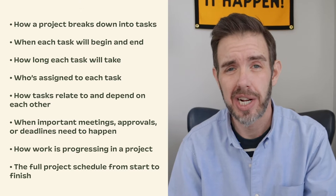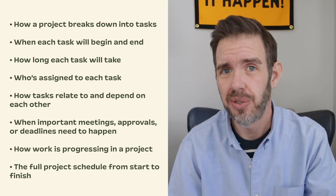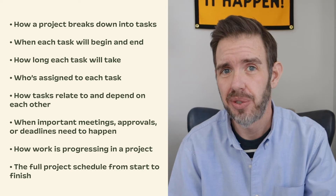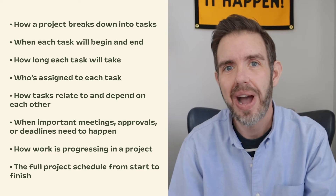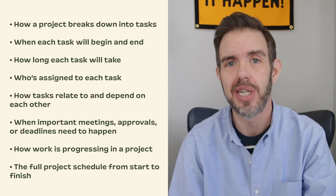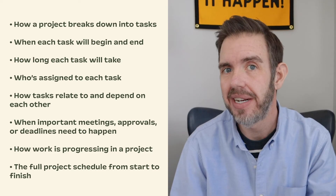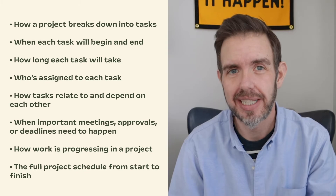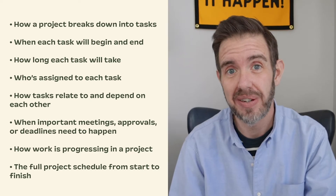That story tells me and my team how a project breaks down into tasks, which immediately shows everything that needs to be done on the project. Then it shows when each task will begin and when each task will end, which you need to communicate in terms of deadlines to stay on top of things so that you can deliver your projects on time. I also like the fact that in Gantt charts, like in TeamGantt, I can show how long each task will take in terms of estimated hours as well as calendar time. The Gantt chart will also show who's assigned to each task, so there's no confusion about responsibility. Gantt charts also show how tasks relate to and depend on each other. Your Gantt chart will show when important meetings, approvals, or deadlines need to happen, and they're typically signified by milestones — I did an episode about that on Coffee with Brett, so definitely check that out if you want to learn more.